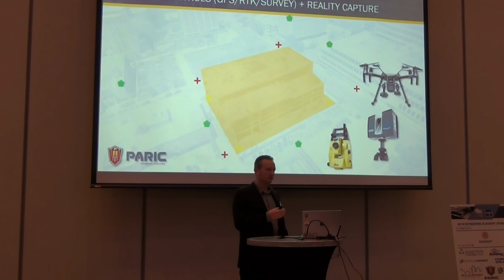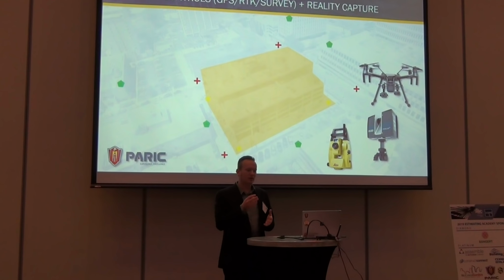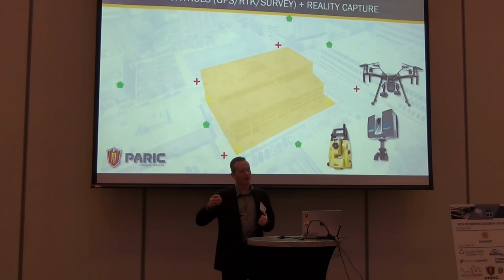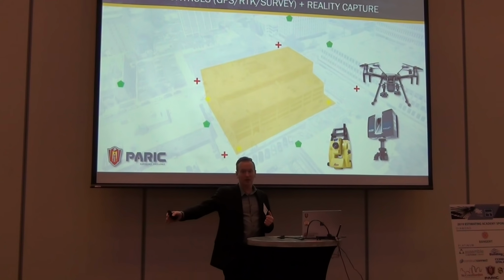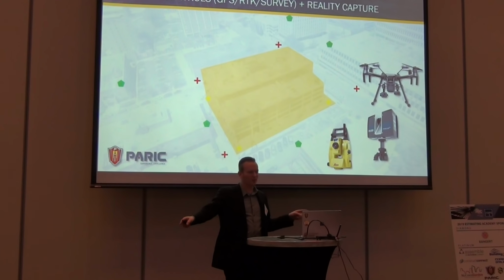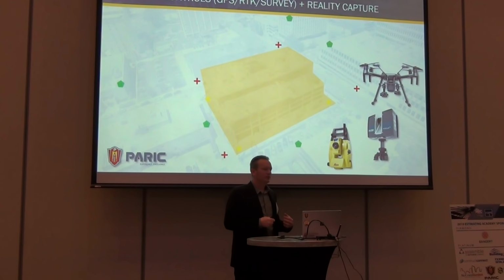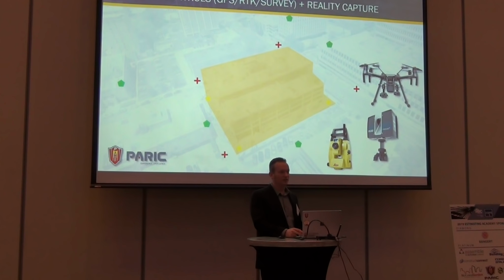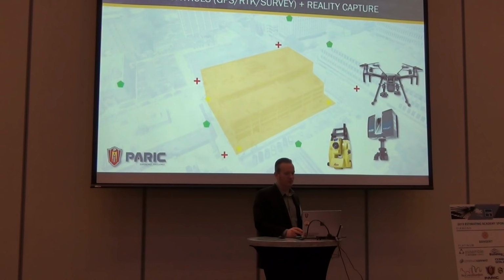But it gives me a baseline, and then as we go through the construction process, now I have something I can always go back to and compare and see how we're tracking on the project. At the end of the project, I can look back and say, where do we land and where do we start? And what kind of happened in the middle? That's information that we can actually do something with. Otherwise, it's just data, and there's no need to just collect more data. We have piles of data.